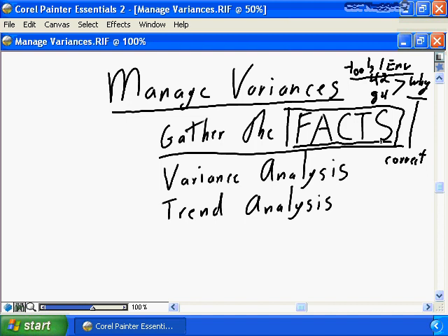Or we're gathering the facts that simply says the estimate was bad. We did an estimate, we thought it was 42, all of the tools, all of the environment are correct, but it's simply not enough. We are going to have to accept the fact that the project estimate, at least in this particular instance, was bad, and we need to understand that there will be instances where this happens, that there is no corrective action, and you simply accept the fact. Going forward, we are now 42 hours over on our budget, which means we're 42 hours worth of labor over on our budget.